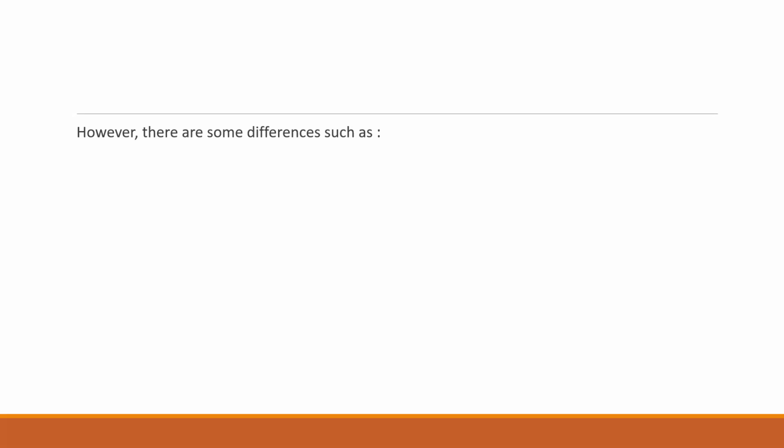So it makes use of 3 completion time estimates: optimistic time, pessimistic time, and the most likely time. Using these 3 time estimates, we can come to some value for a particular task. But remember, it is probabilistic in nature.